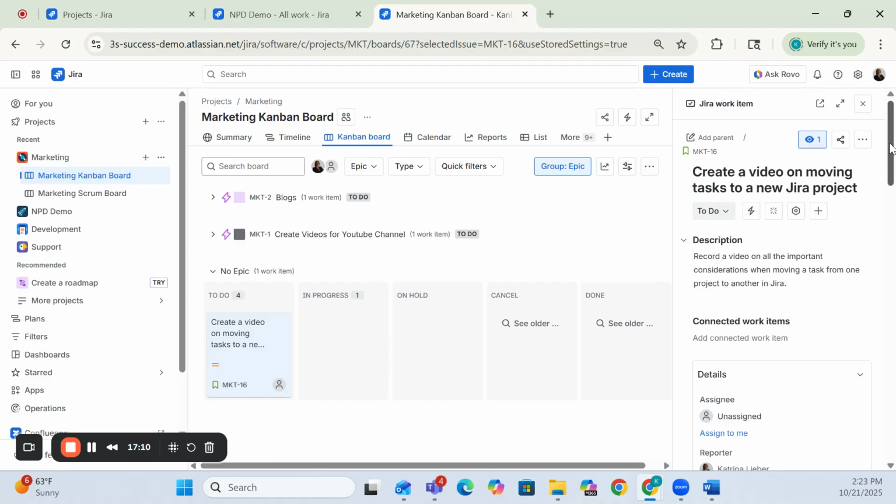So I always, always, always recommend applying extreme caution when you are moving a task from one project to another, specifically if you are doing it in bulk. Still be careful with just one task, but I really, really caution against making bulk changes and moving all the tasks at once until you know what the full implications of that data are. So if you are going to lose data, just make sure that you have a field that you can map it to in the destination project.